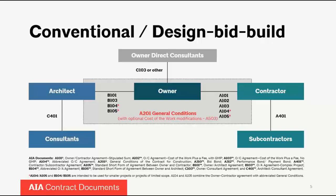Sometimes an owner will engage other types of consultants directly. Those consultants may inform some aspect of the project, either in the design or provide some influence to the design. For example, the owner might engage a cost estimator. Oftentimes the burden to supply surveys is on the owner; civil engineers are often owner-direct consultants, separate and apart from the architect and its design consultants. That all happens usually in the design phase before construction starts.